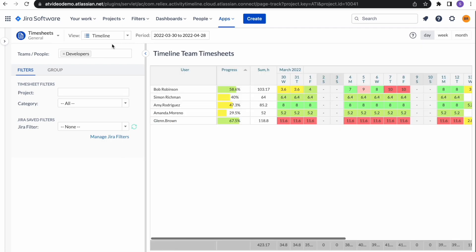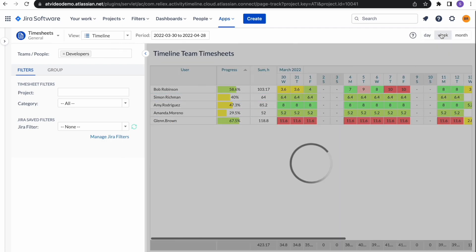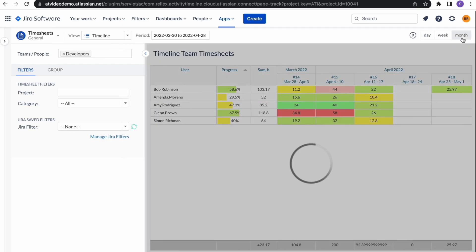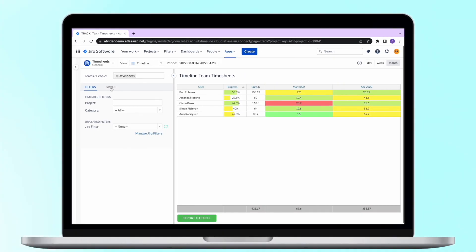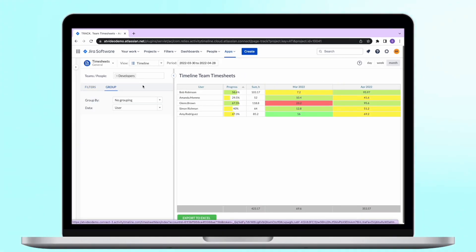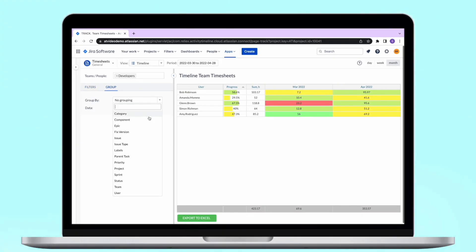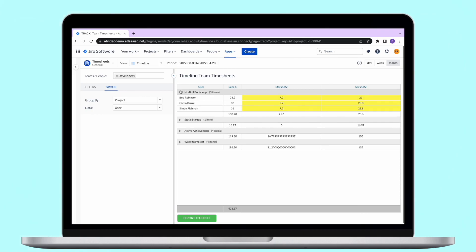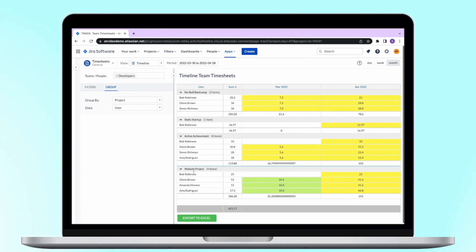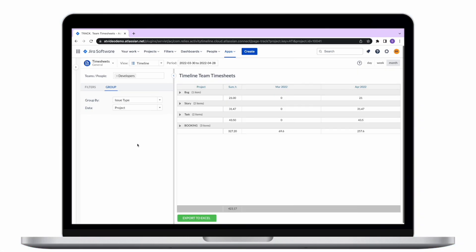Timeline report shows how users log their hours over time for each day, week, or month. In this timesheet you can also decide how to group data. For example, you can see who contributed to each project or how much time was spent for each issue type, to know the amount of spent time for bug fixing and for new development.